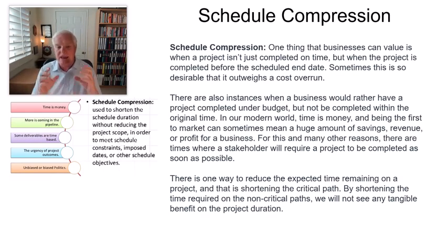There may be a contract line item that says that any time you can deliver, say a week early or 2 weeks early or 3 weeks early, there's an incentive that may make it worth the wait of trying to go ahead and get a schedule completed early. If there's no impact for overrunning it, maybe it makes sense to outweigh the cost overrun, the schedule overrun. So you need to be able to look at schedule compression.